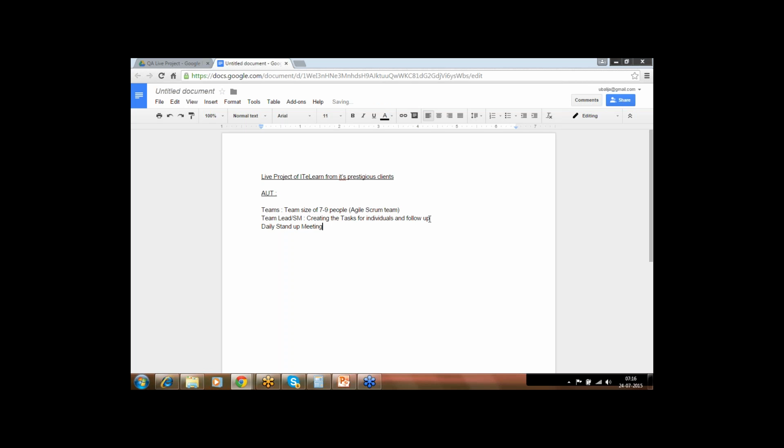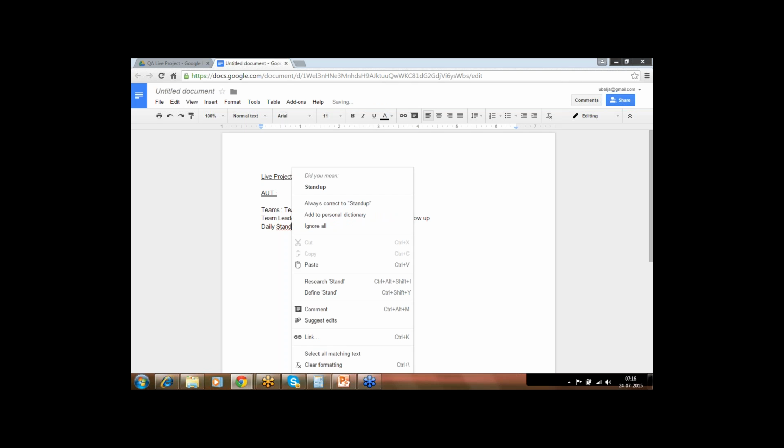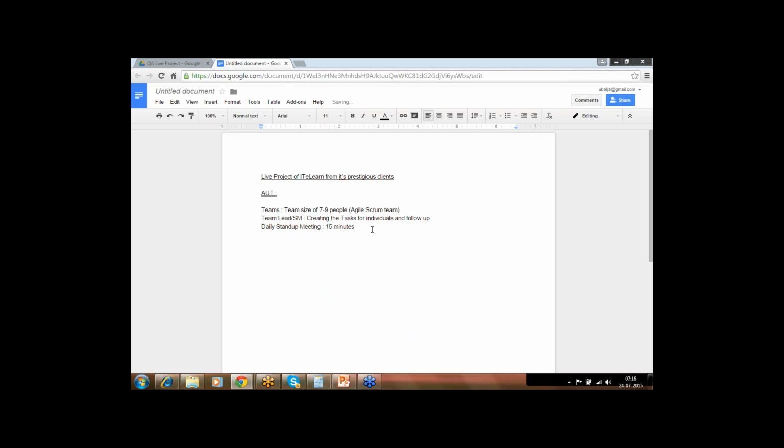A daily stand-up meeting is just for 15 minutes, not more than that, depending on your need. If somebody wants to discuss a little bit more, you can extend it, but you need to have just a quick 15-minute sync-up to talk about only a few things. The first thing that you have to talk about is what you have